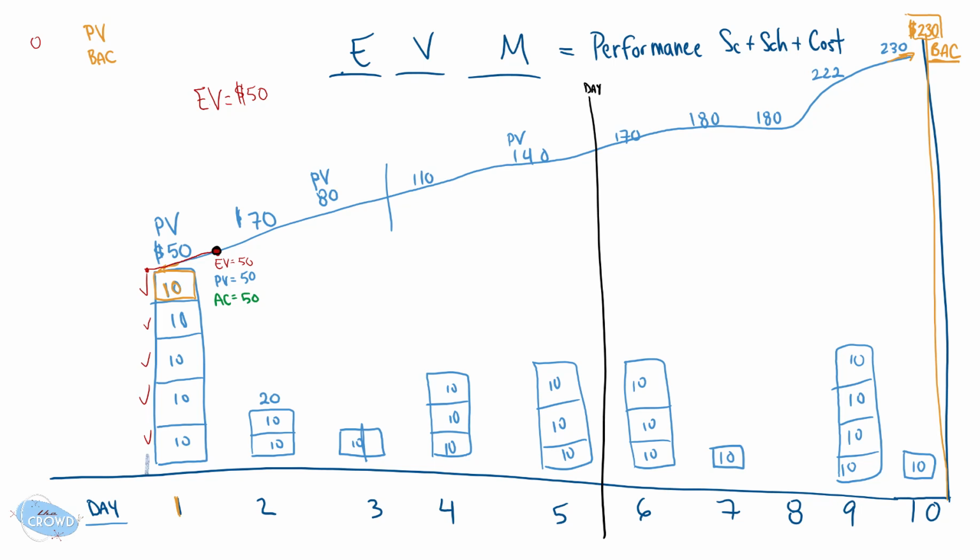All right, returning to the end of day 5, we had a planned value, as you recall, of 140. That was planned, regardless of what has happened before, even if you count that 50% on day 3. I'm still saying at day 5, this was planned, because remember, this was an approved baseline. It is hopefully not going to change unless there are a lot of reasons, and we'll go through formal change control if necessary.